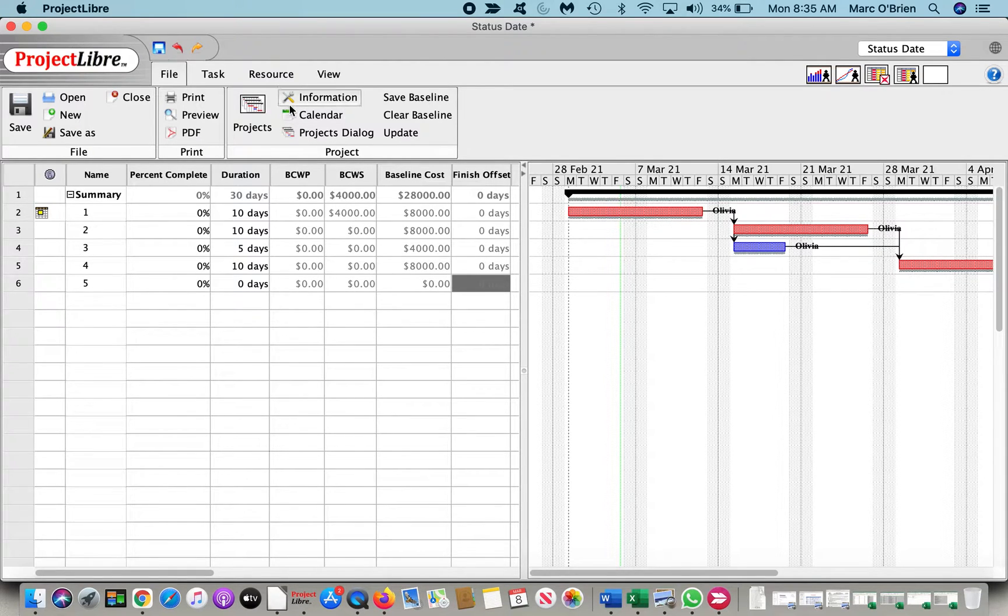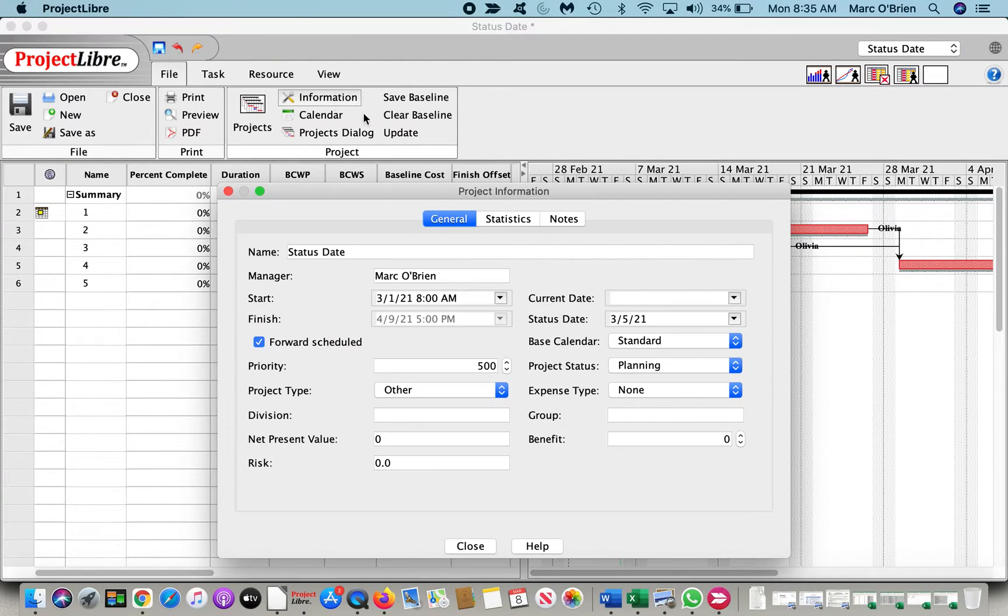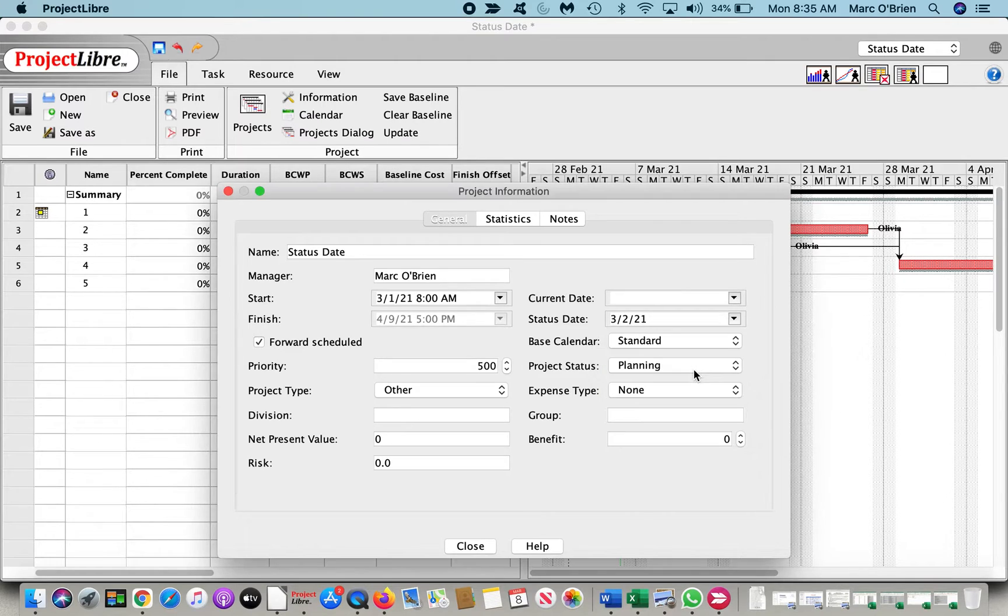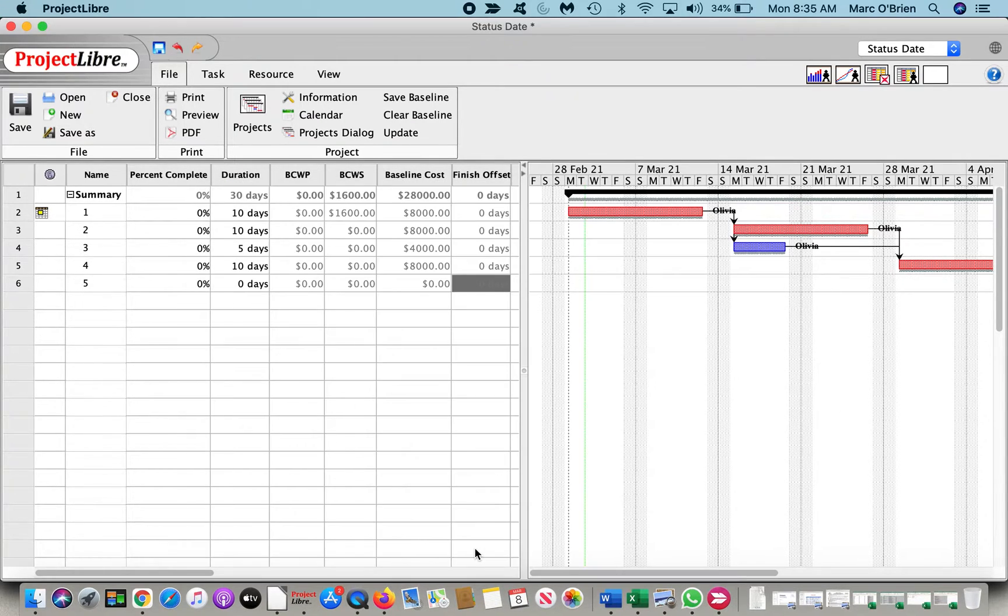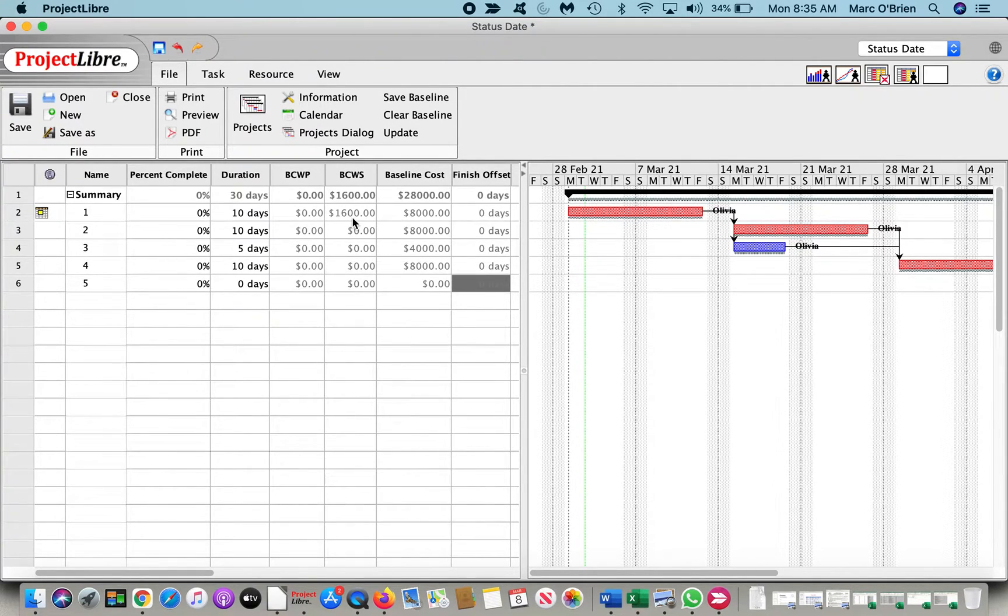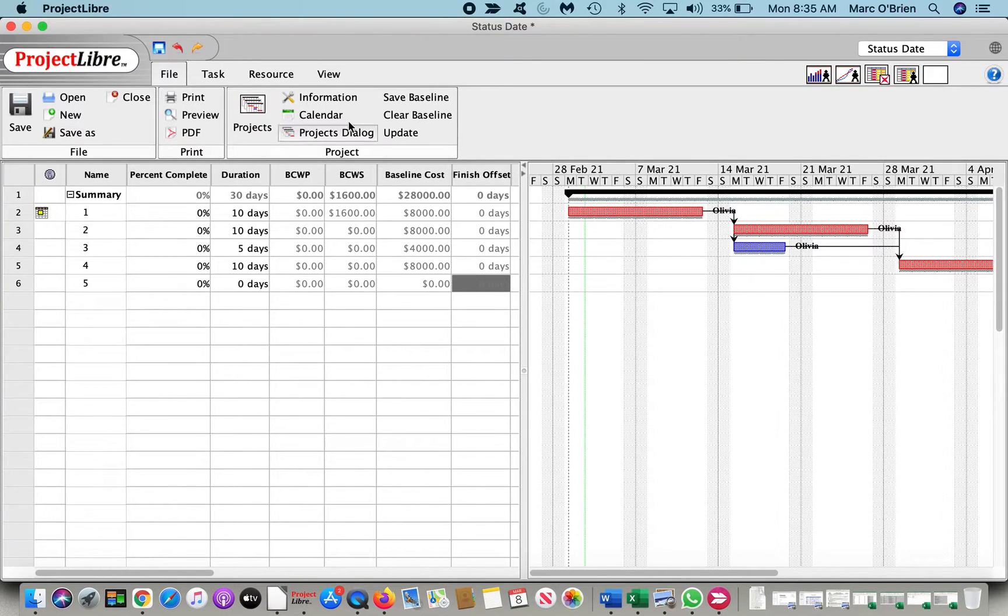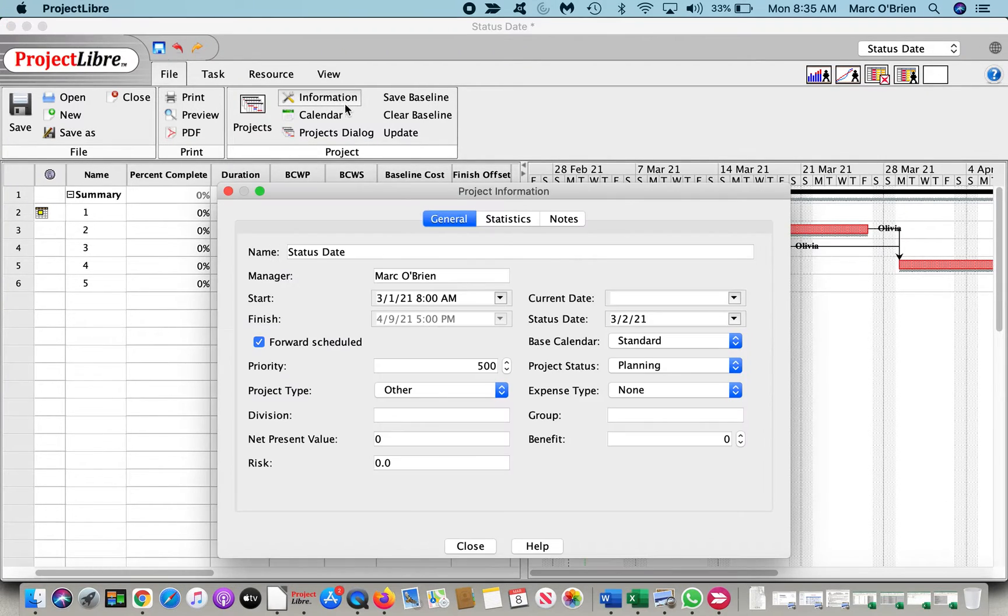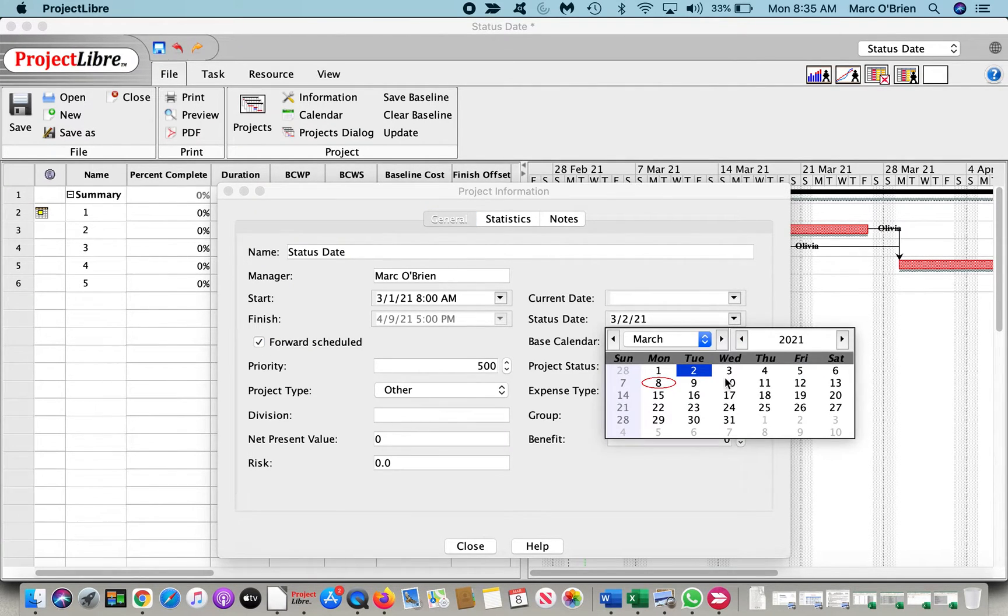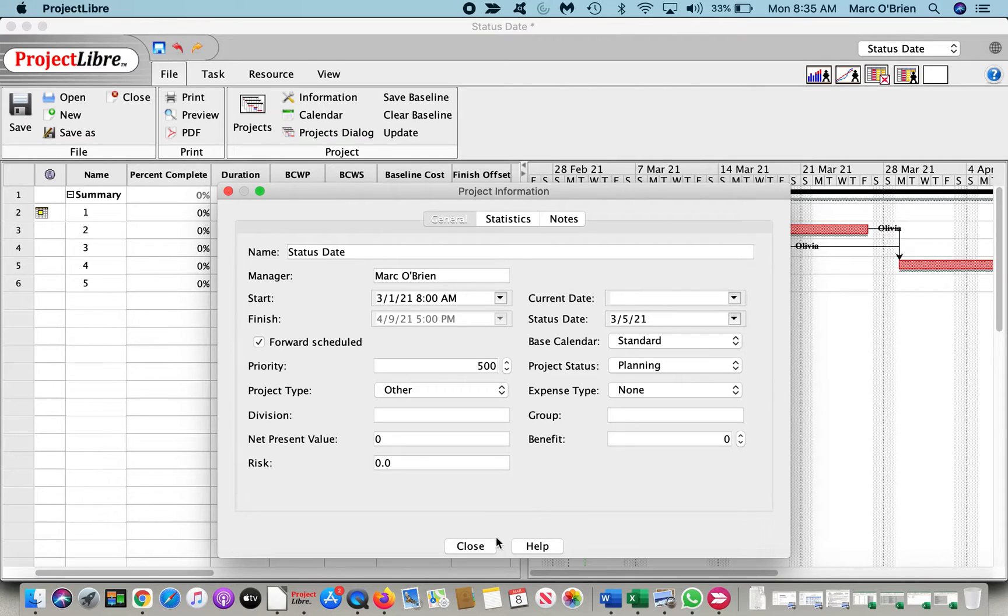What if it's a different status date? Let's change this to March 2nd, close that, and you can see that the BCWS has now changed because on schedule, per that status date, we would have only completed a couple days of that work. For simplicity's sake, let's change this back to the 5th so that it's 50% complete.